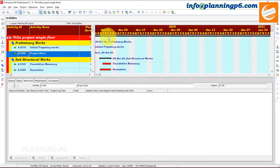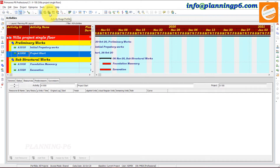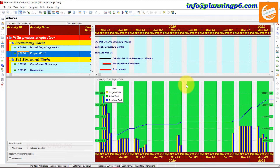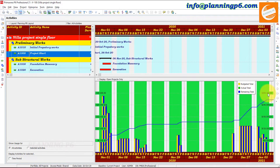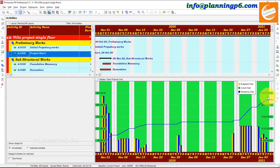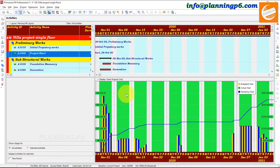Let's move forward and open Primavera P6. The project is already opened and we will directly go to the Activity Usage Profile, which is here under Resource. Open it. After opening, here is the option my friend wants to change — these values. The question was that his total cumulative was seven thousand hours but here it is showing twelve thousand hours. The option is that it will divide all values into five sections, whatever your cumulative value is.